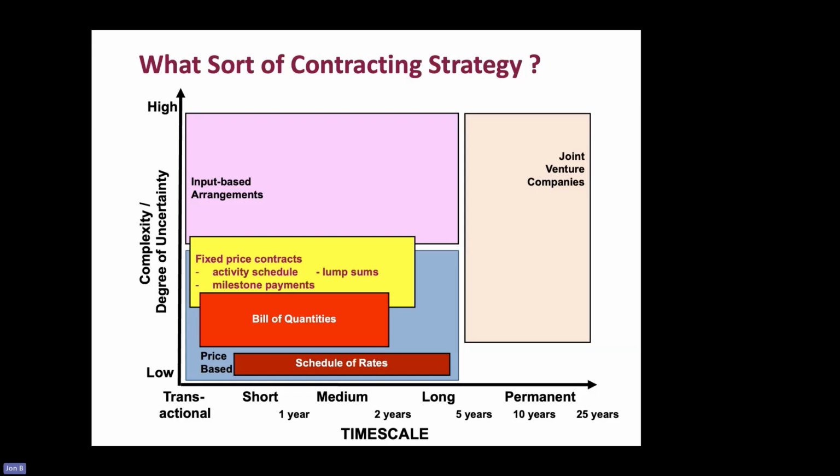Because what you don't want to do is, and I've got 4 on my finger, if you specified all 4 things which were within that activity, and you didn't finish one, then you wouldn't get paid anything for it. But if you just specify one and you finish it, then you get paid for all of them.